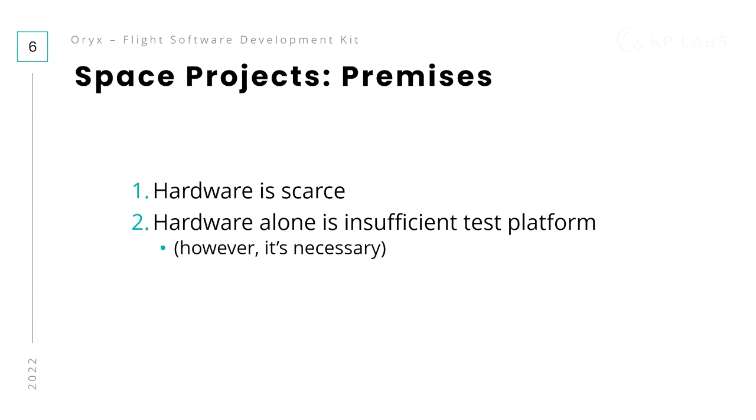So I think it's quite normal in the space industry, especially in the CubeSat industry, that the FlatSat and AIV activities are the first place where you have all the components on the table and can test them. And that's usually very late in the project. So if you wait for that, that's probably not a good idea. You want to start earlier, right?